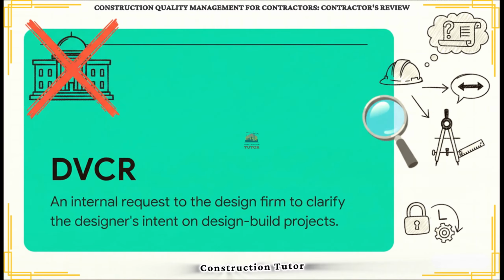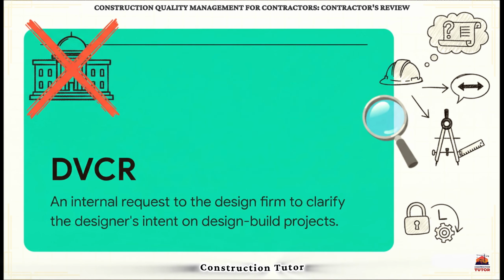Now, back to design-build for a second. In that world, you don't always have to run straight to the government. The DVCR is basically your internal RFI. It's the formal way for your construction folks to ask your design folks, hey, what exactly did you mean by this? The DQCM handles it to sort things out internally first. It just keeps the whole process way cleaner and more efficient.